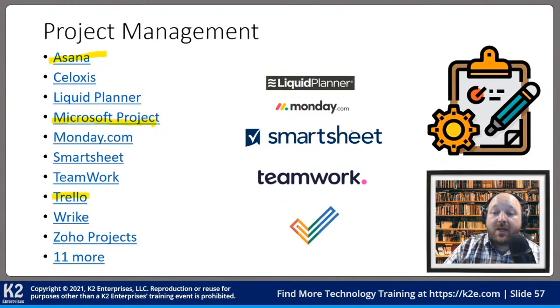So you'd have a swim lane, for example, of to be done, what I'm currently doing, and then done. And you drag the card from each swim lane from left to right, or right to left, whatever you choose to do. The benefit is that you can visually see where the status is on any particular project. And overall, I find it works really, really well.